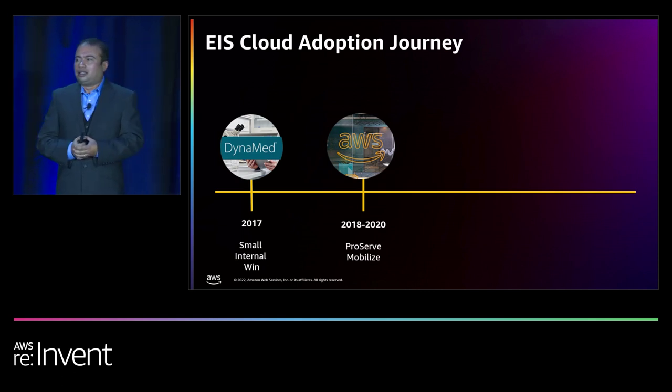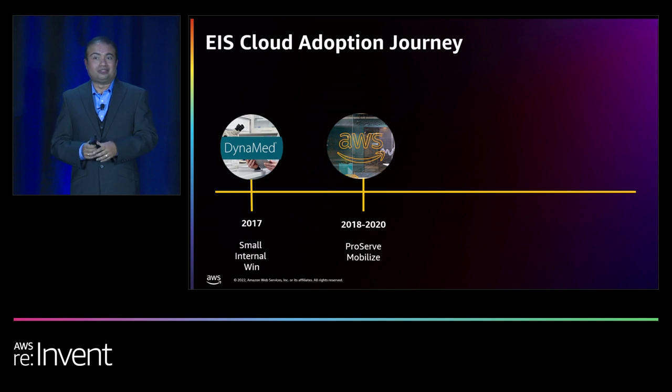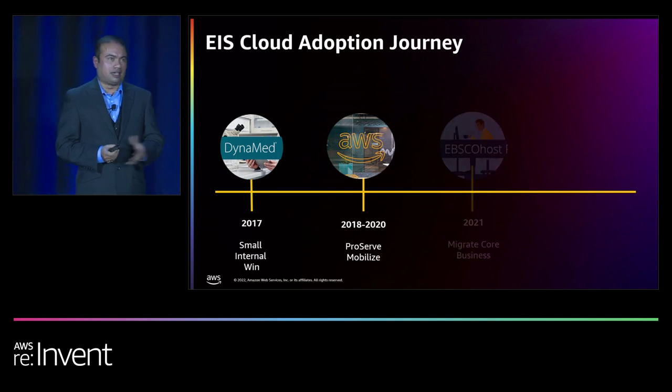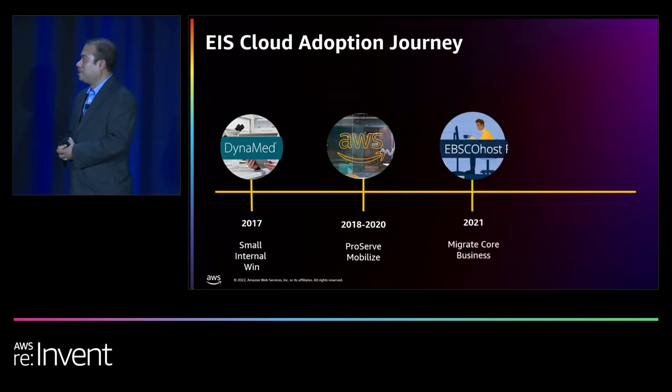We built in milestones and a lot of focus on thoughtful precision on cutovers, because we are not talking about an application of 5 services. We are talking about an ecosystem of 100-plus services, with a lot of dependencies, monoliths, non-cloud-native services, and of course relational stateful dependencies. 2.5 years down the line, last year at the same time, we were successfully able to migrate EBSCOhost and a bunch of other related products to the cloud without a single customer-facing disruption. So that was pretty good.